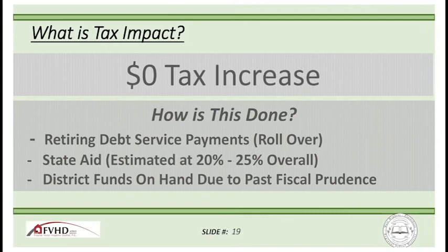Voting for that to be submitted to the Department of Ed tonight does not obligate this Board of Education to bring the question forward in November. All it does is authorize the submission for the aid determination from the department, which is required to put the referendum question forward. And I just want to make sure that everyone's comfortable with that idea, that you are not authorizing the project tonight. You're authorizing the submission so the department can review the application to determine the aid allocation, project by project. You guys all right? You're all looking up, just making sure.